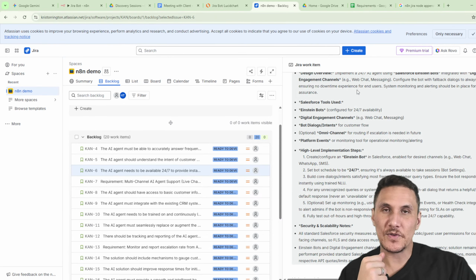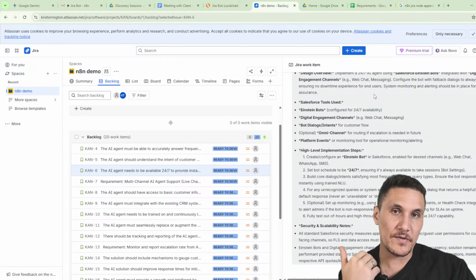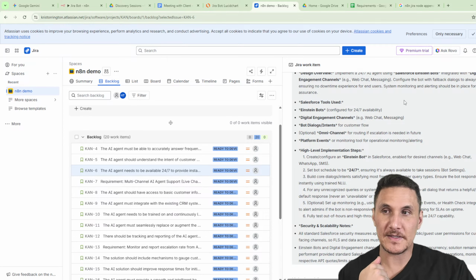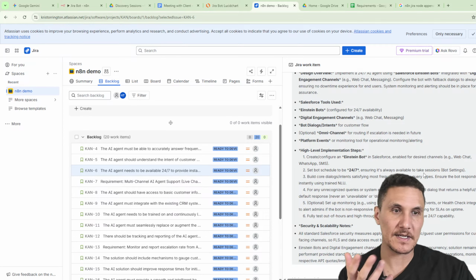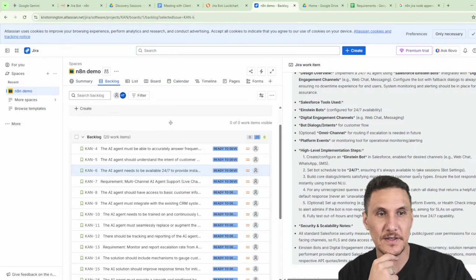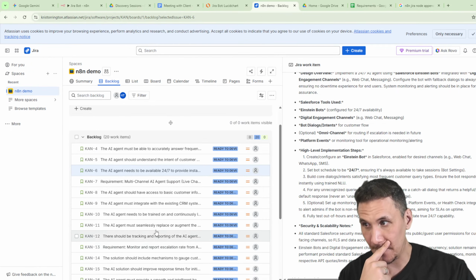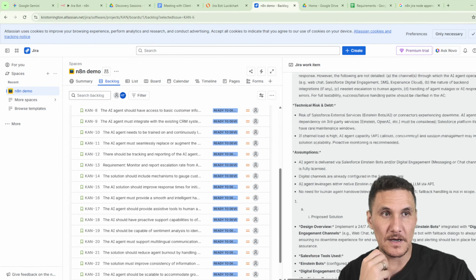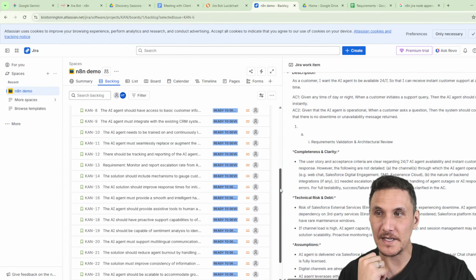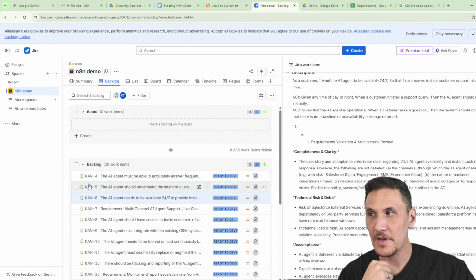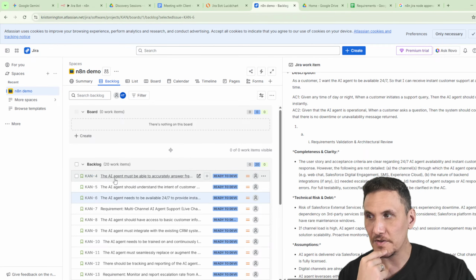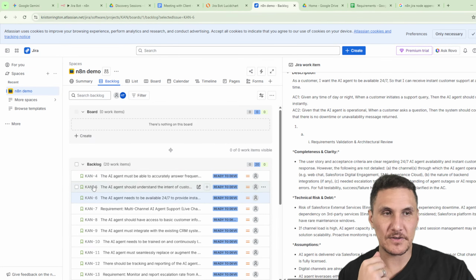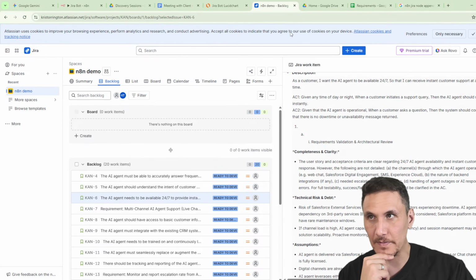You probably need to make sure that all of your fundamental setup is done first before we can actually complete each of the user stories, right? So that's where I guess the project manager may come in handy. If the project manager is able to sequence these in different events, so you know, Jira ticket 4 gets developed, Jira ticket 7 gets developed next.